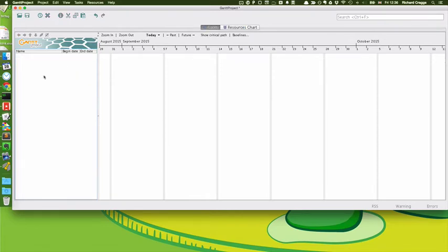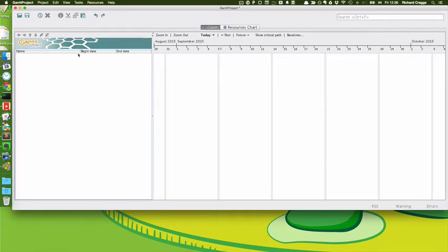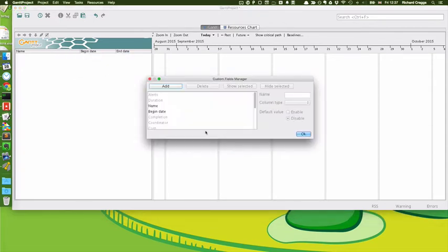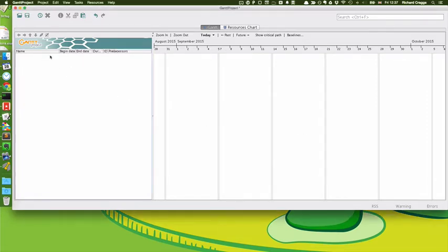Right, so now I add the tasks. Before I add the tasks in, I'm going to add some columns into here that I always want. If you right click on the header, Manage Columns, I want duration, add that, ID, I want to add that, and predecessors. There we go. We'll sort those column widths out in a bit.